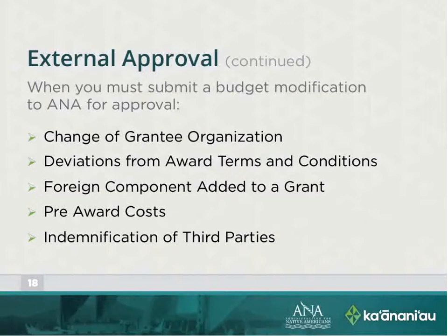Another instance of a grant transfer is if an organization is dissolved and they want to transfer it to another organization that may be down the street or in the same vicinity that does the same or similar kind of work. In that case, we would ask the receiving organization to submit a full application and provide assurances that the project will continue to be implemented and hopefully retain most, if not all, of the employees from the former organization.